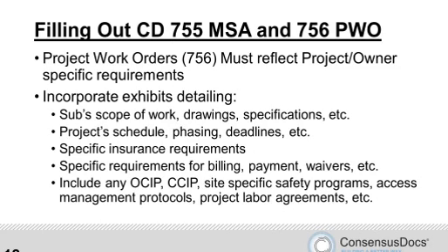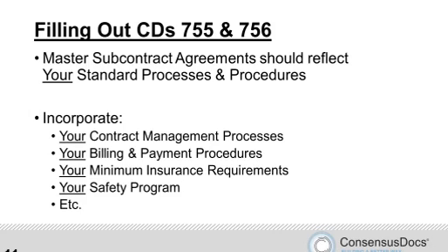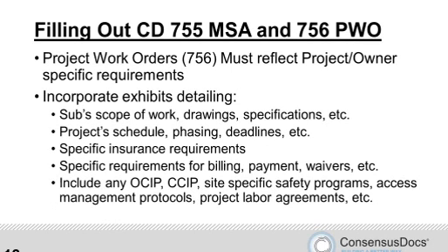For example, things like your safety requirements, your payment application forms, your insurance compliance statements. If you have a hazard communication statement, if you've got joint check agreements, waiver forms, billing forms, whatever those are, the things that you're going to use to manage your subcontractors, not your individual project, but to manage your subcontractors, that are generally applicable no matter which project you're on and which owner you're working for. Attach those here. It's easier.